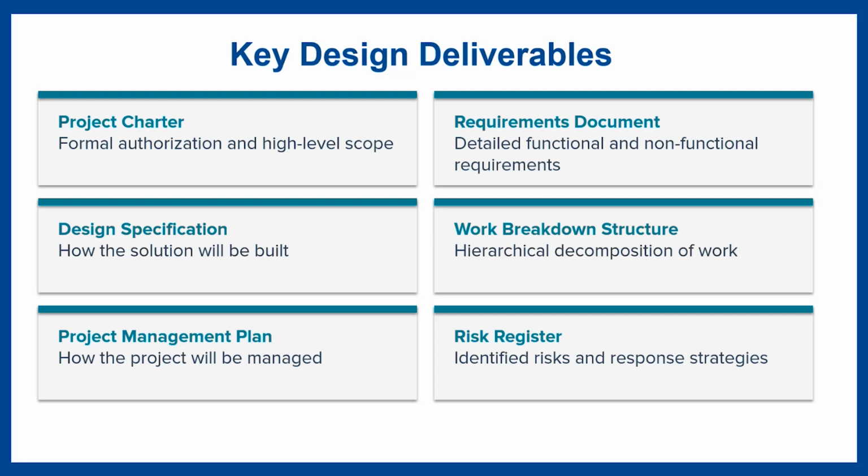Number 5 is the project management plan. The project management plan outlines how the project will be managed across all key areas. It covers the scope, schedule, costs, risks, quality, communications, and resources. This is your playbook for managing and controlling your project.